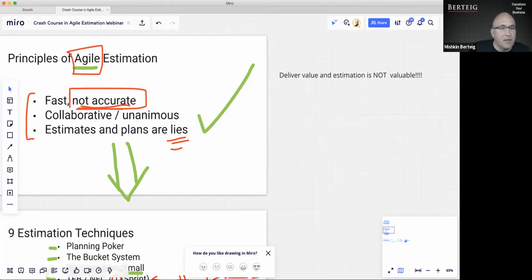Okay. So what happens is we do some planning, we estimate the amount of work that a team can do in any units. It could be points, it could be hours, it could be anything. It doesn't matter. Then they do some work and we check how much work did they actually get done. And then we measure that and we use that to update our plans if we want. I think someone mentioned a weighted average or something like that.